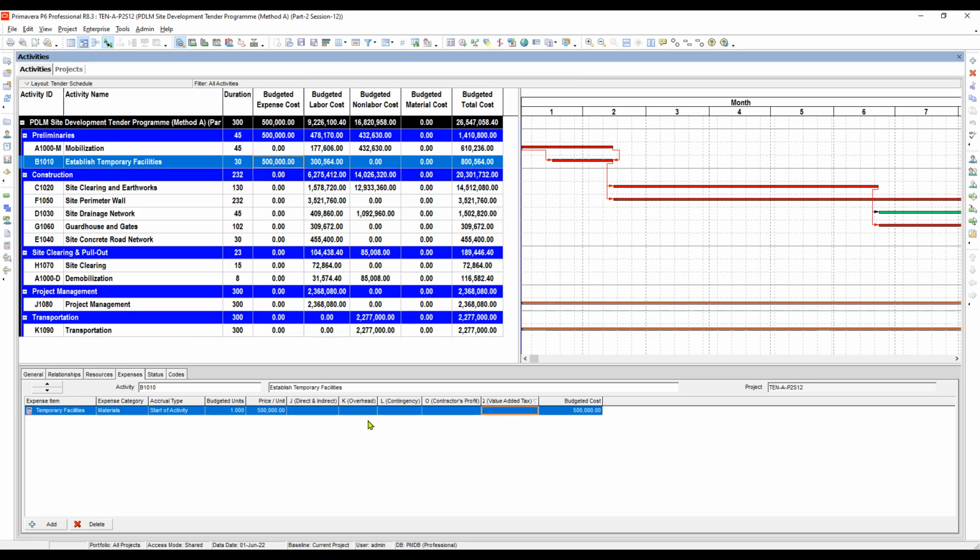Okay, here. So the column of the parameters that we just defined in the user-defined field for the project expenses is already shown. As you can see, it is zero value because we have not yet calculated it. Once we calculate it through global changes, the formula will be run by global change. This area here will be populated.